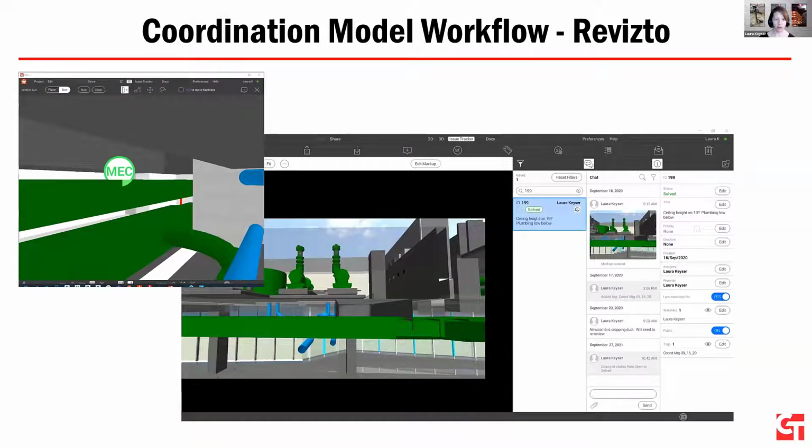We can really easily go through in a meeting. So when I'm running a coordination meeting, I can stamp that this mechanical duct has an issue with something, and then I can go and fill in information. This ends up turning into an attachment to our meeting minutes, so we can keep a running conversation. We're trying to get more subs on board and into the program too, and that way we can assign issues more easily.